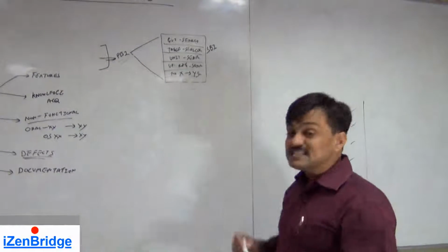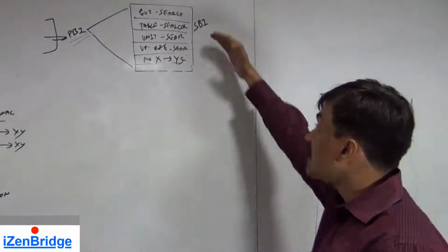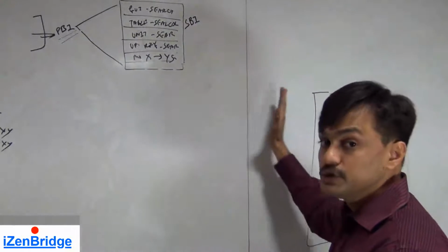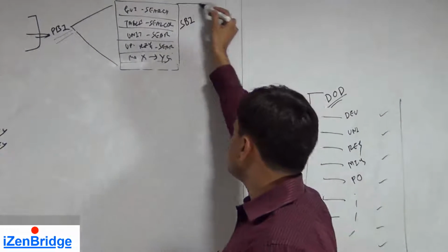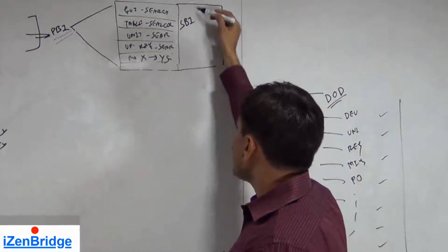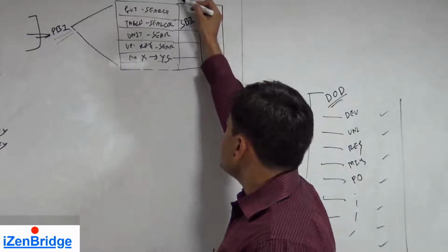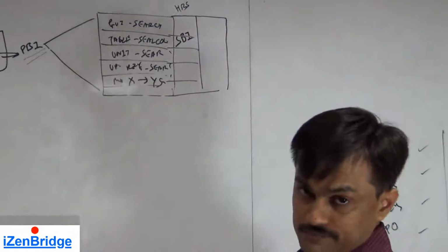So while creating a sprint backlog, we also need to consider our definition of done, because the tasks which you are creating here are driven by your definition of done also. While creating a sprint backlog, we also estimate the ideal hours needed for each engineering task.